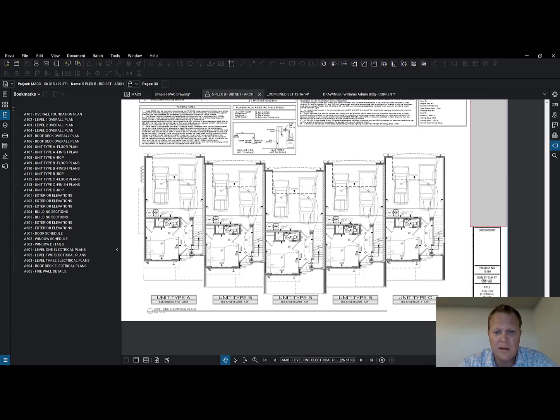It's just that this method of construction is going to lend to something else: the mechanical contractor is probably going to get hired to do the design of the mechanical system fully, and all we make sure is that we're coordinating how we're going to feed all these, and making sure that the mechanical contractor that gets hired is paying attention to things like the beam that's right here for the structure, and we're paying attention to that kind of stuff.